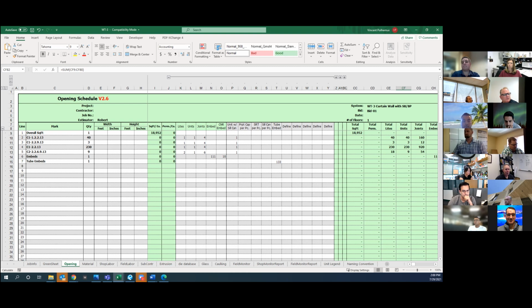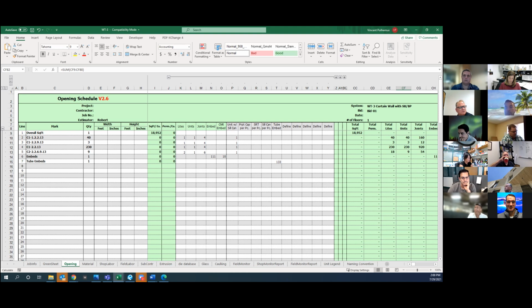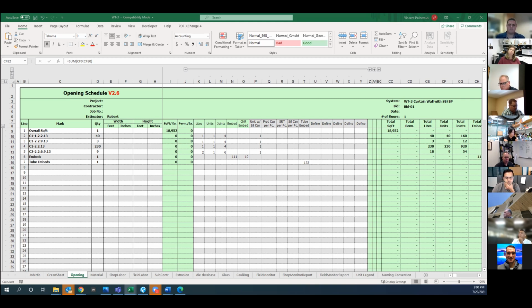So for today, if a job kicked off, you would definitely be able to look at that sales model and see the counts. Absolutely, you would be able to see in the sales model that that parapet cap was only the width of the unit, because it would get modeled that way. Yeah, so then that's an opportunity for us, if we can increase it during design, to have fewer panels to install and less welding, and get a kickback on the material or update the quote before we place the order, right?